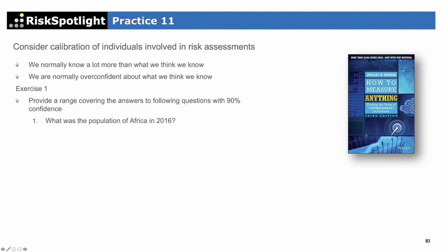Okay, and in this case, the one point I want to highlight is this book. Yesterday there was some discussion on that. Even when we were using Monte Carlo, for example, there was a question: but we're still providing a subjective input, and how do we know this is better quality or not? Agreed, that's a very valid point, and that's where you need to read the How to Measure Anything book, because there is a process you need to go through. It's called calibration.